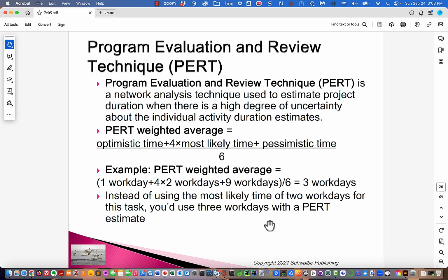Oh, here's PERT right here. So how do you turn three numbers into one value? Well, they have a formula that would be expressed well here if there were a few more parentheses. You collect three values: the optimistic, the most likely, and the pessimistic.